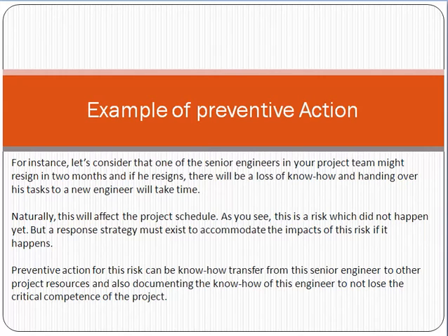But the reactive approach is that the months pass, and after 2 months the senior resource resigns, and at that point there is no backup of that senior-level resource who can take the project ahead, and it becomes a very big issue. Then you hire a resource. After hiring, you have to deliver the knowledge of the project to that resource, and at least 2 months are required for this whole process, and it will badly impact your project. So this is the reactive approach.